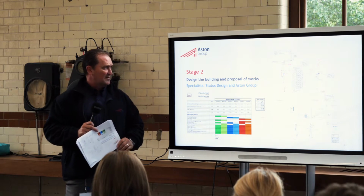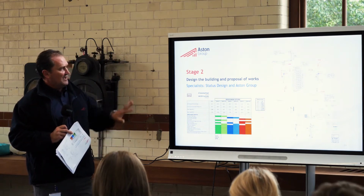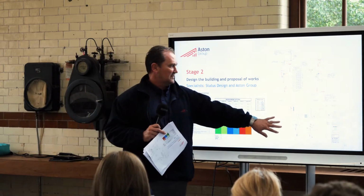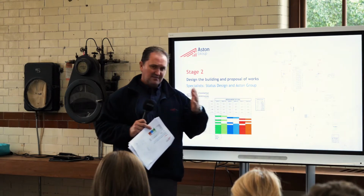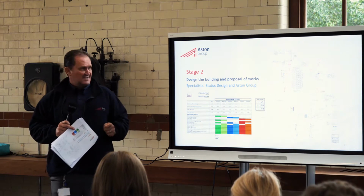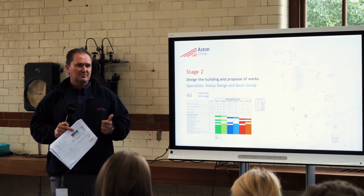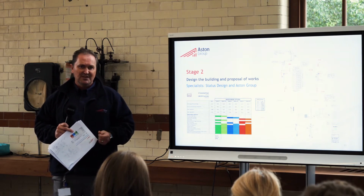So we met with London Borough of Waltham Forest and said, budget-wise, time-wise, what we've got available. These drawings will come across as the design drawings, stroke working drawings. That gets agreed. Then we employ our team to come along and create it. So the objective of the whole thing was to show to landlords, leaseholders, that it can be achieved.